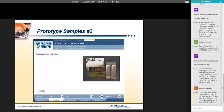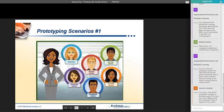We do a storyboard in PowerPoint, where we show them that and they look at it and say, yeah, I'll produce that, and then we produce the prototype. After we produce the prototype, we actually have to run it on the client's technical architecture. It's very important to do that, especially in situations where you don't necessarily have high-speed internet. Even in corporate situations, you have firewalls and all sorts of stuff. Some of them can't play Flash, so you really have to be careful about what technologies you use and whether they're playable in the environment and on the devices they're ultimately going to be played on.